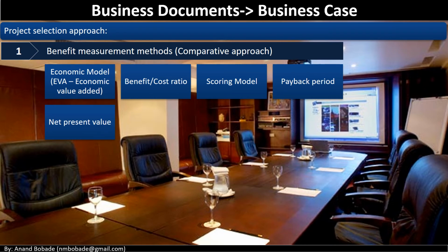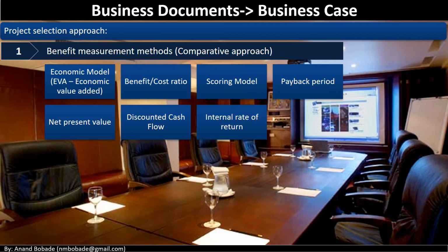Net present value. Net present value is the difference between the current value of a project's cash inflow and the current value of its cash outflow. The NPV must always be positive. When picking a project, one with a higher NPV is preferred. Discounted cash flow and internal rate of return, we will discuss these two methods separately.